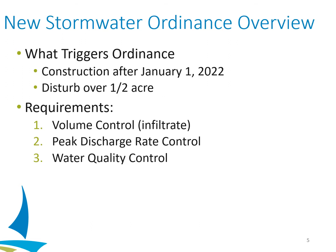In terms of what triggers the ordinance: the ordinance will go into effect in 2022, so if your project is in construction after January 1st of 2022 it is subject to the ordinance. And if the project disturbs over a half an acre, it will trigger the ordinance. If your project is both in 2022 and triggers the ordinance, then it will be subject to the three main requirements of the ordinance.